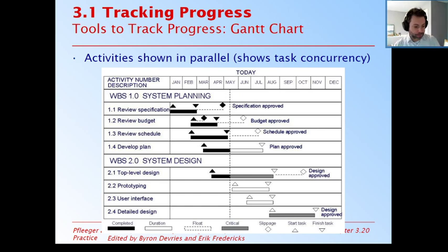Anyway, one thing that we have here is that it is very easy to game the system with a Gantt chart. Let's say that we are all working on a project. I have all of you developing tasks. You're all doing something in parallel, and somebody can't make it this week, and their task is going to be overdue. Well, I could just change the start date and throw everything off. At the end of the project, we're not going to know that history. We are not going to know that we started shifting things around behind the scenes.